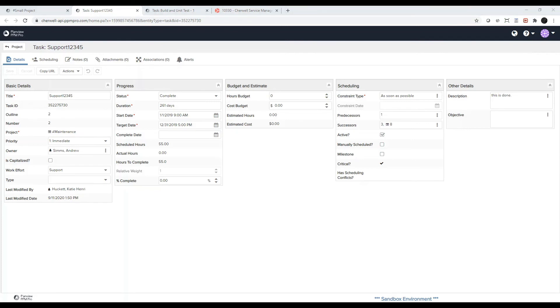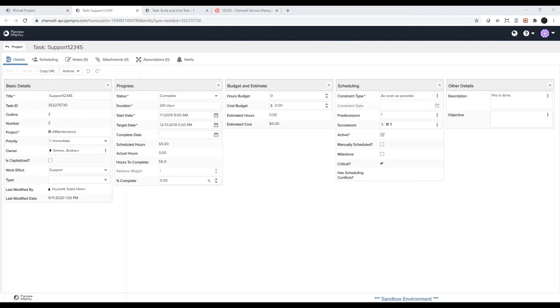As I touched on earlier, once you have your initial imports of projects and tasks into Cherwell, the sync process will happen daily with the Cherwell scheduler. It can be set up to run in the off hours, so everything is up to date when work begins in the morning. The scheduler can be set up by your Cherwell administrator, and will run similar one steps to those we ran manually, but the filter only imports projects and task records that have changed in the last 24 hours.